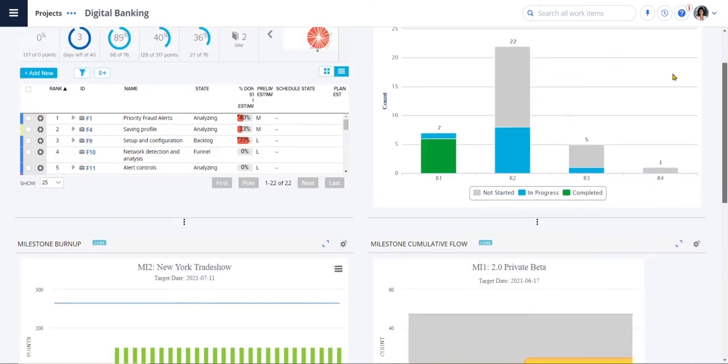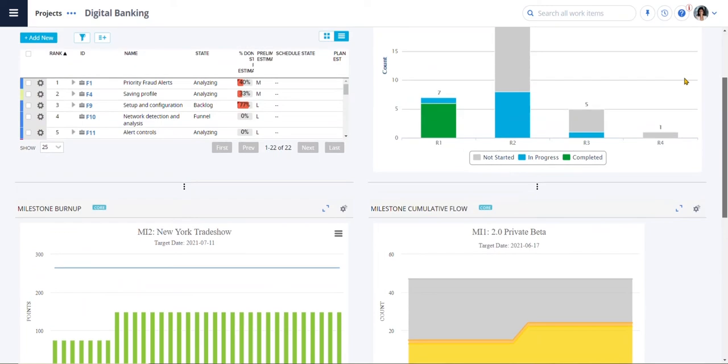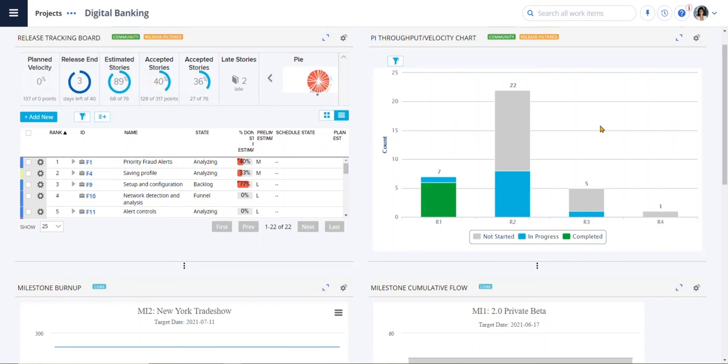The power of using real-time data allows us to actually know whether the work is really on track. Within one to two iterations we should know if the planned work can be completed. If not, it allows us to make trade-off decisions without ever having to ask someone if they are done or done done. These metrics and others help drive engineering excellence.